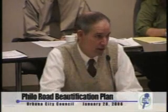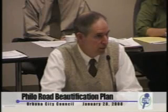Maybe last question first. We plan to do that in 2008, so it'll be this summer. It'll be part of our resurfacing work that we do. I know the Bicycle and Pedestrian Advisory Commission has seen this idea on Philo Road as part of the bicycle master plan. Yes, the engineering is essentially done. Jennifer Selby has done the geometry, if you will, of fitting this into place. There'll be some median-related work near Florida Avenue. We have the rumble strip median that will have to be changed in that area. But it's largely a mill and resurface and striping, and it would fit quite well, actually, in this corridor.